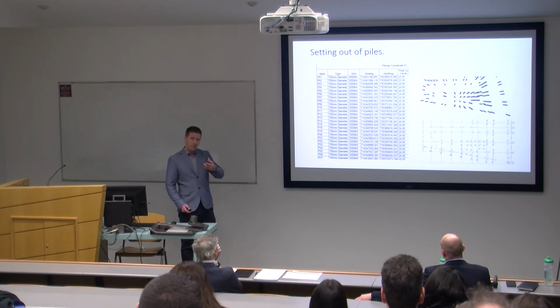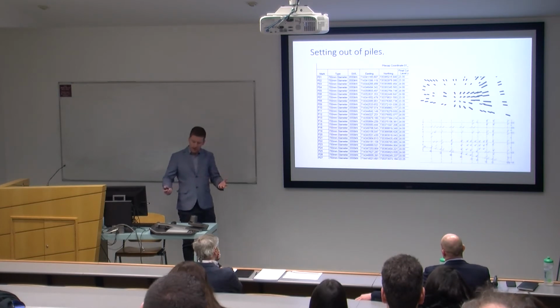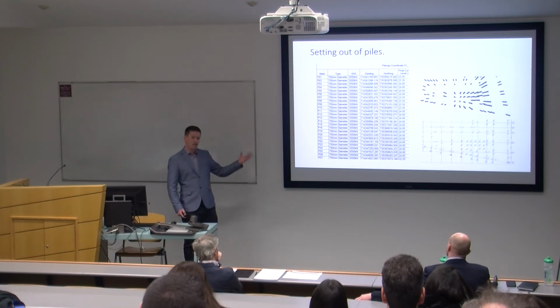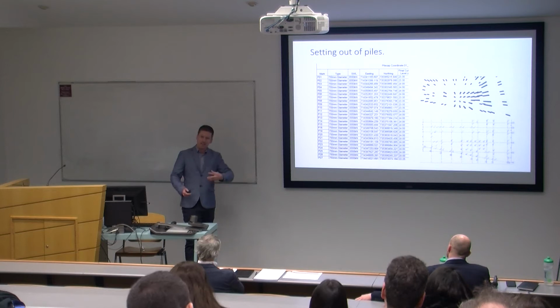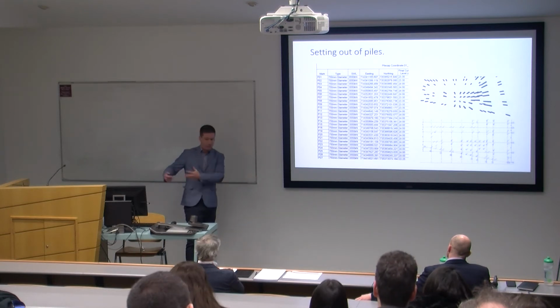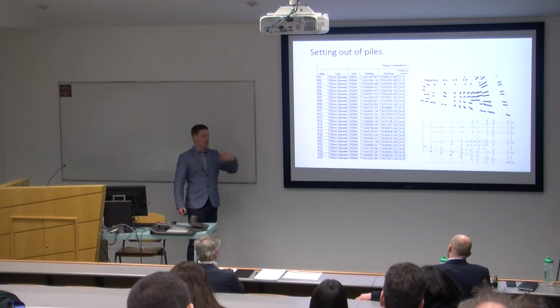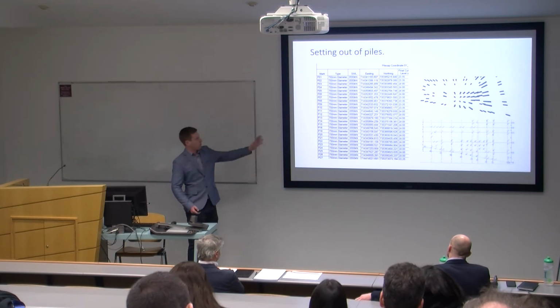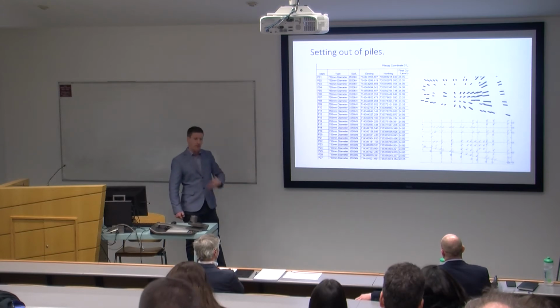An issue we had on our site was the model was always in the design folder. The model's design, and all the drawings are extracted from that model, and the drawings are in the construction folder. So if you were to go with the model, you're technically using the design drawing because the model is within the design elements of the drawing. So you would be doing that at risk. In order to mitigate that, even if we want to be more efficient, you'd use the model, but you'd cross-reference it with a few of the northings and eastings just to make sure everything's in the right place.